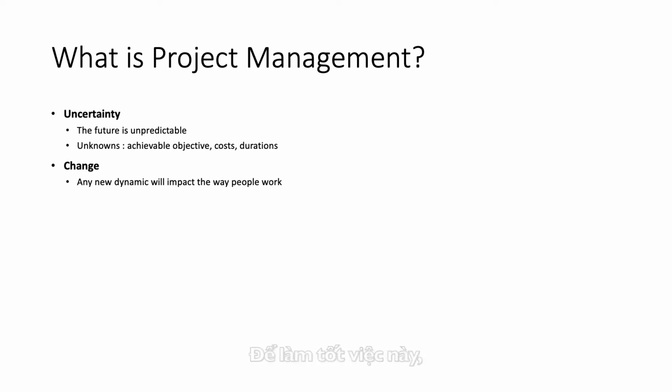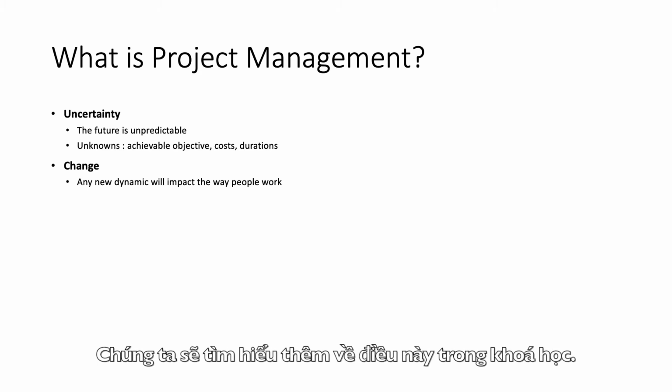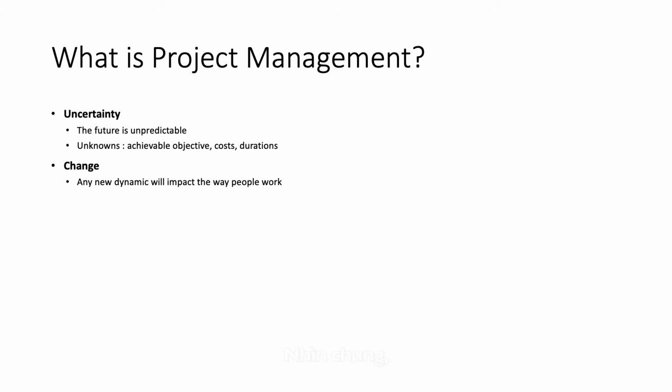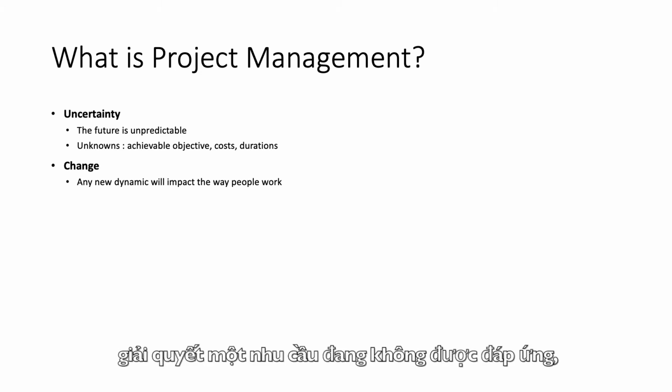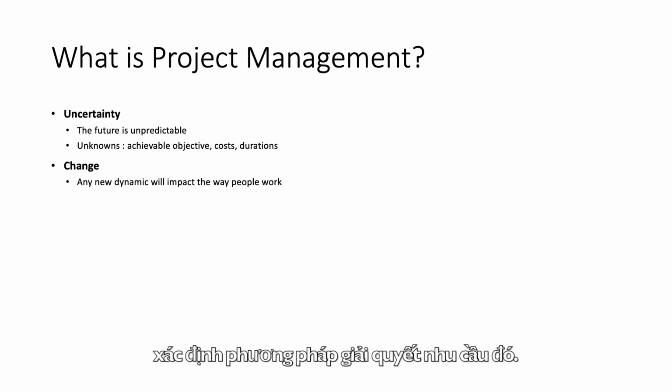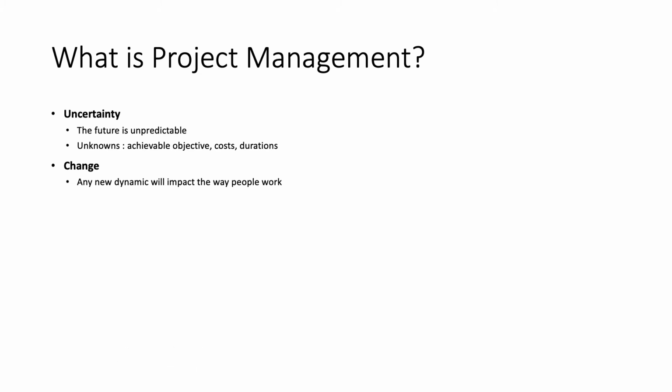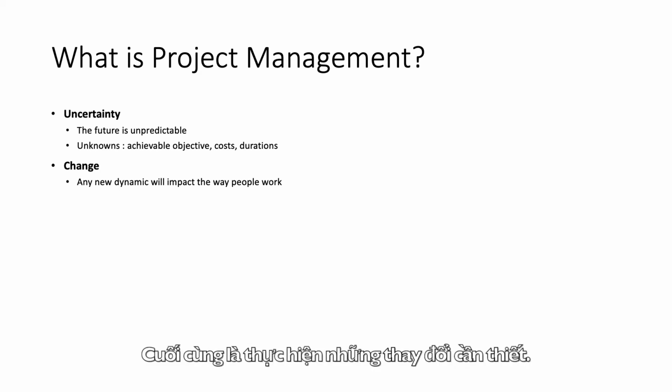To do this well, the project manager has to develop a set of tools to deal with change. They're called change management. We'll talk a little bit more about that in this class. But in general, change management involves addressing a need that is not being met well, determining how to address the need going forward, and then going through a relatively formal process to describe and adopt the needed change, as well as finally to implement it.